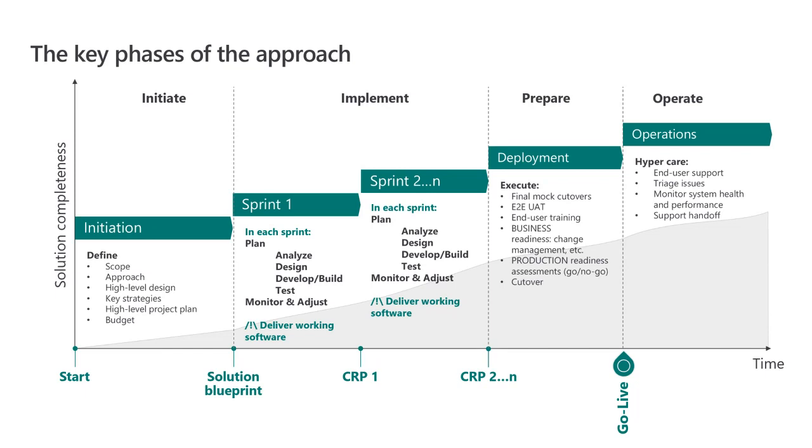And by initiate, that includes all of the activities, including all the pre-sales activities leading up to the definition of the project, maybe the definition of the project charter, where you've defined your project goals, you've defined the project scope, you've got a reasonably good idea of what approach you're going to use, you have a higher level view of the design that's going to be part of the delivery, you've got your key strategies defined, and you'll probably have a budget and a high level, at least a milestone level project plan. Right? And all of that culminates in a solution blueprint.